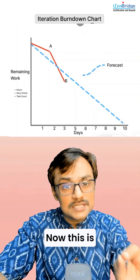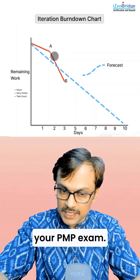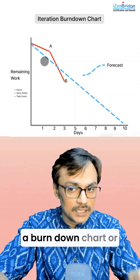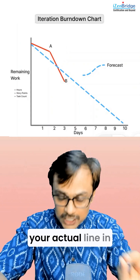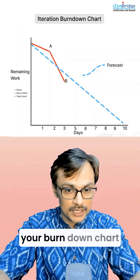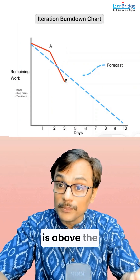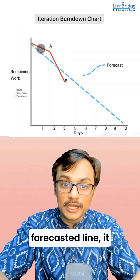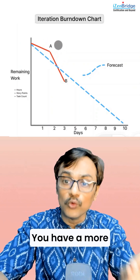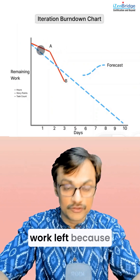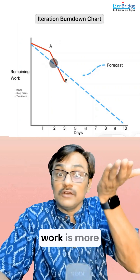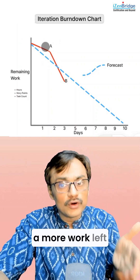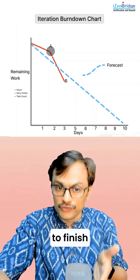This is an important concept for your PMP exam. When the actual line in a burndown chart is above the forecasted line, it means you are going slow. You have more work remaining because your remaining work is higher than expected. So you have more work left to finish.